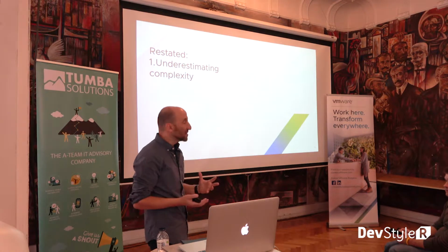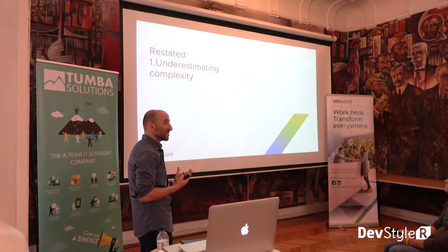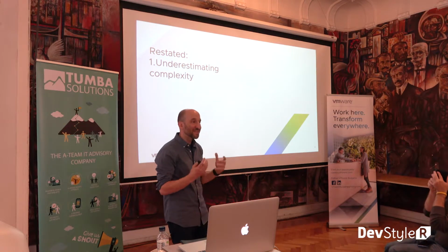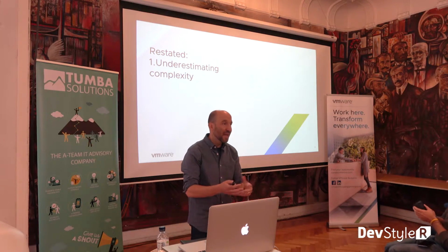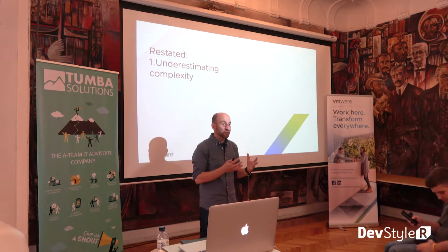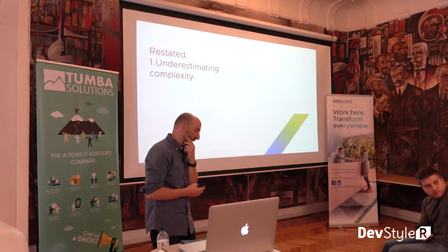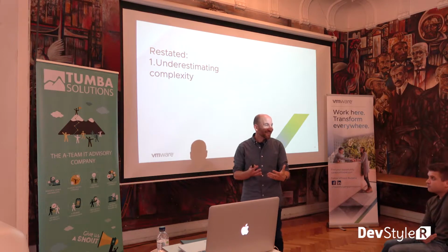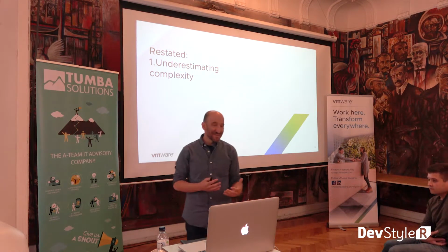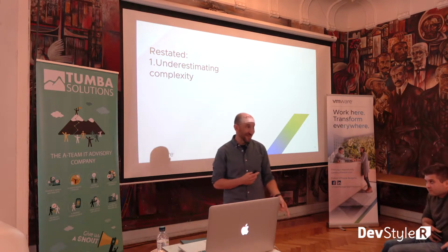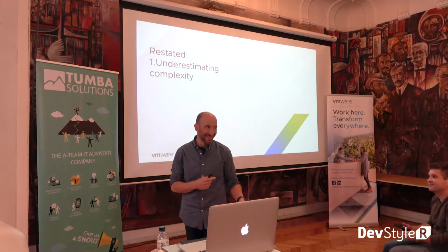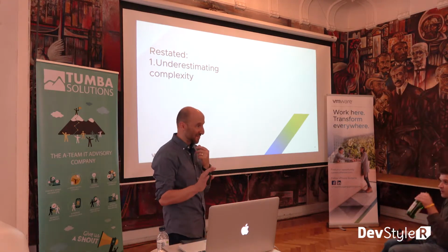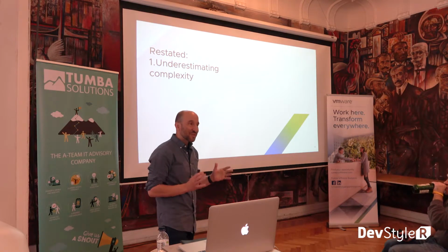So I would say the number one mistake that we made was underestimating complexity, right? When we look at something, we just optimistically assume it's easy. And this is the age-old problem. You have the most senior developers and they'll say, no, that's going to take 4 months. And you have the junior developers over here who will say, no, we can do it in like a week. Right? And which one do you pick? Some of the product managers will go, yeah, a week, we can do it in a week. Okay, I'll pad it, a week and a half. There we go. Right? And the other guys are saying, it's going to take at least 4 months, and probably then it's not even shippable. But the truth is it's somewhere in between.